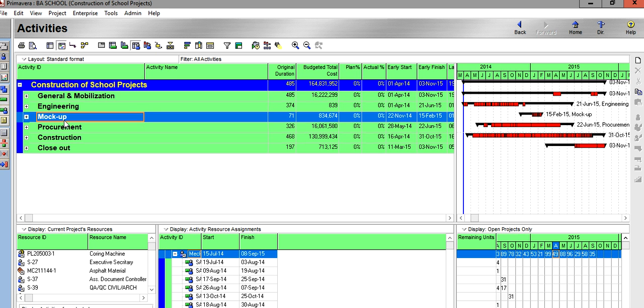Okay, so we have to make sure that we link the BOQ to the Primavera, because the Primavera schedule defines the subsequent activity, whereas the BOQ is only the items, and we don't know what the missing activity is. But in the Primavera, the subsequent activity is required.